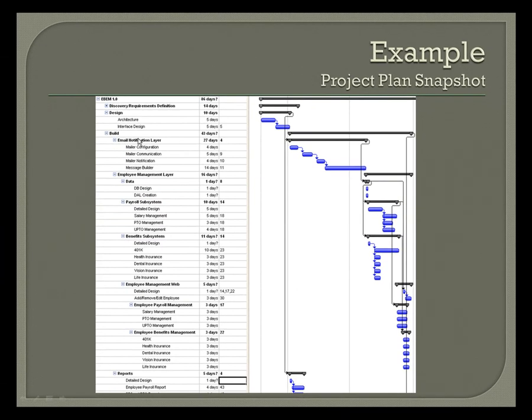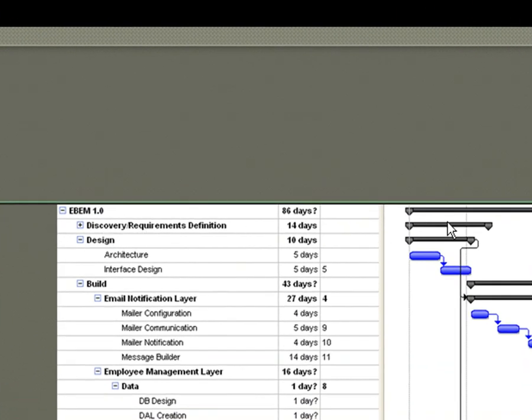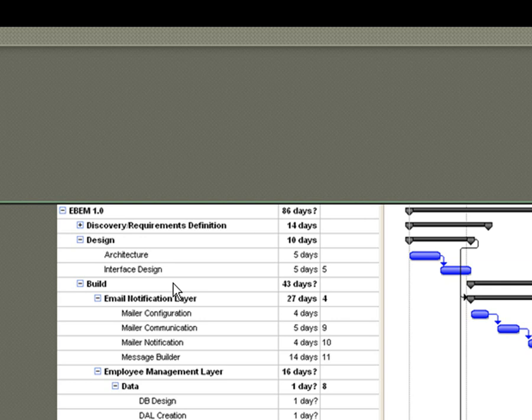But you see here, the first thing we need to complete is discovery, and actually I put those as parallel. This should all be shifted over a little bit. But all the build depends on the design being complete. And so, all the build starts right here.